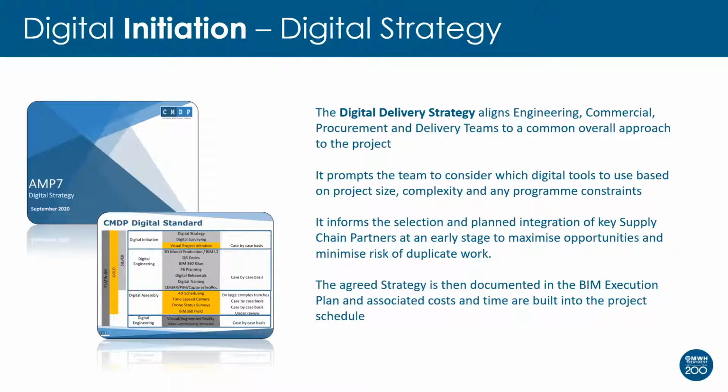Because we've got multiple schemes in our framework, it's a £300 million framework, and some of the schemes are relatively low value, rather than have loads of strategies, we've got a baseline standard to say, right, for this type of scheme, we're going to run with these tools as default, no question. This is what we're going to have as our standard. But then we do review if there are any areas where we might want to supplement that strategy with some of the other tools. But I can't stress enough the importance of setting your stall out early on.